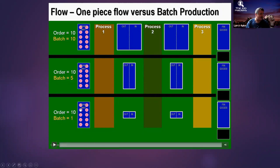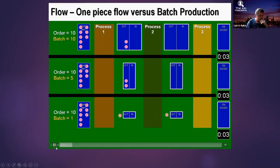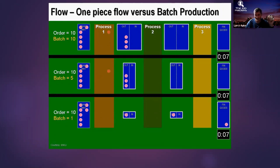I'll play the animation and stop at certain points. The minimum batch size is one — called one-piece flow. If I have one-piece flow, looking at the bottom of the animation, I already have something I can sell. I do not yet have anything I can sell in the top two conditions.